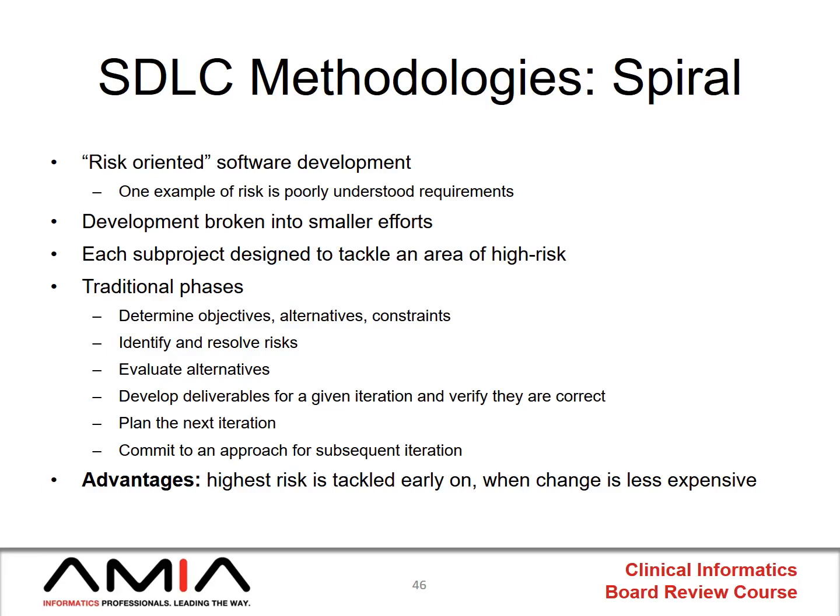The advantage of the spiral methodology is that your highest risk is tackled early on when change is less expensive. And that's a recurring theme in all these SDLCs, is that you want to tackle risk early and not wait till the end.